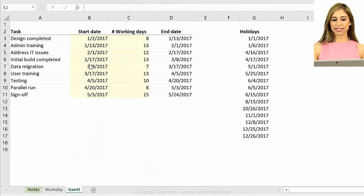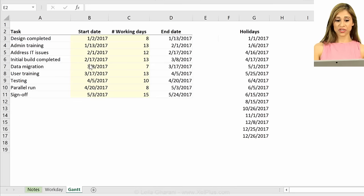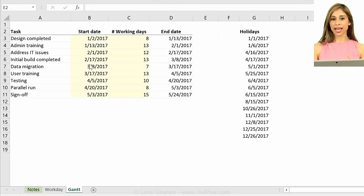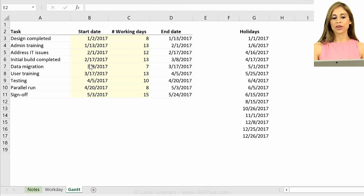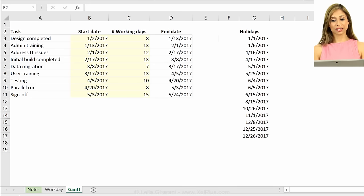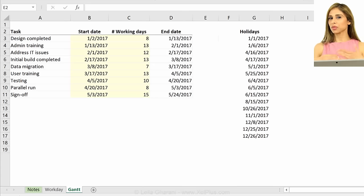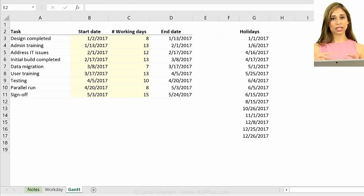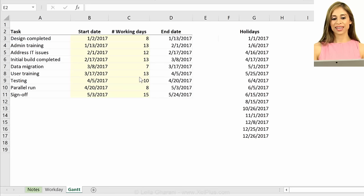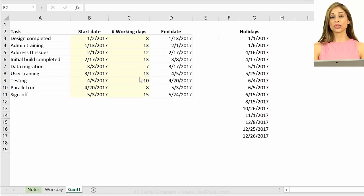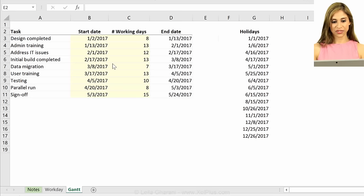So this is our data set, and based on this data set, we're going to create our Gantt chart. There are different ways of doing this. You can use an actual Excel chart or you can use conditional formatting and use Excel's cells and format them, make them look like bars. You can use symbols and use the repeat function to get the bars for the Gantt chart.